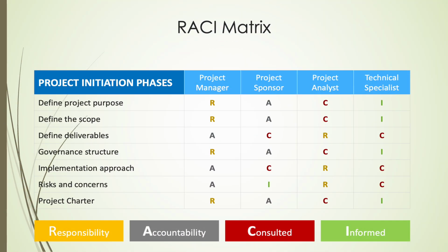Effective stakeholder management is essential for successful project execution, particularly when aligned with corporate social responsibility principles. Using a stakeholder power interest grid, key groups are categorized to guide engagement. Management and investors must be kept satisfied. End users require close management, operations teams and SMEs are kept informed, and the development team is monitored with minimal effort. This structured approach ensures communication, involvement, and influence are proportionate to each stakeholder group's needs and impact, building trust and fostering commitment across the project lifecycle.